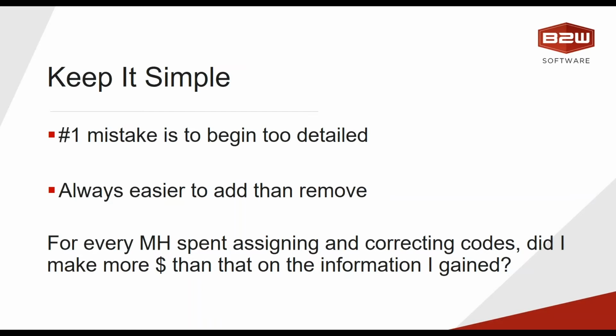Will you make more money by knowing the difference in how you perform A and how you perform B than you lost money in the man hours spent to assign and correct the codes? If having another level of codes is not going to save you time and make you money by understanding your business better, it's probably not worth having the code. Even if it might be cool to know the information, it's going to be problematic for the field to gather that level of detail.